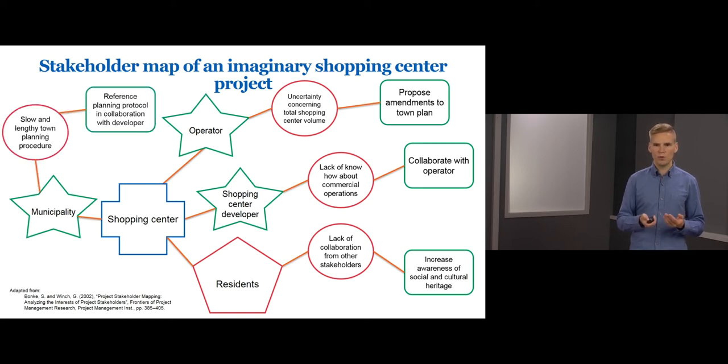Lastly, the municipality's problem is that the town planning procedure is slow and lengthy, which hinders the project's progress. As a solution, they have come up with an idea to team up with the developer and operator. Together, they aim to invent a reference planning protocol that bypasses the formal town planning procedure and speeds up the development.